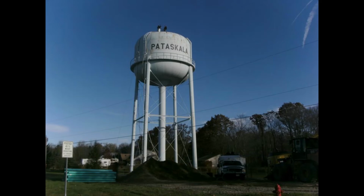Moving on to item number 7. As you'll remember, the EPA with their new lead and copper rule is requiring us to do an inventory of our unknown service line materials. So they did put out a grant for up to $50,000 for these inventory actions. So I applied for the grant and we did get awarded the full $50,000. So we will use that money in the upcoming year to basically hydro excavate the curb boxes in Old Town.